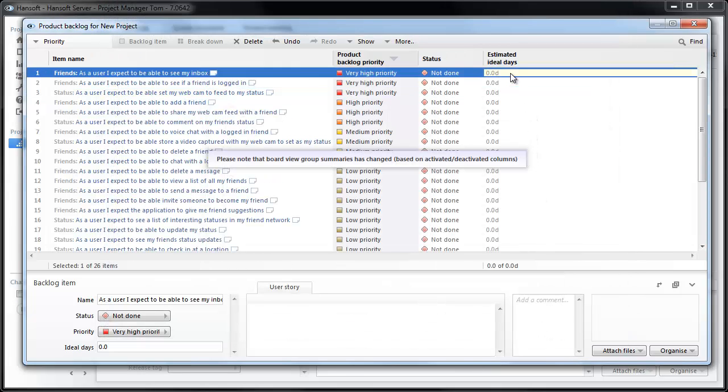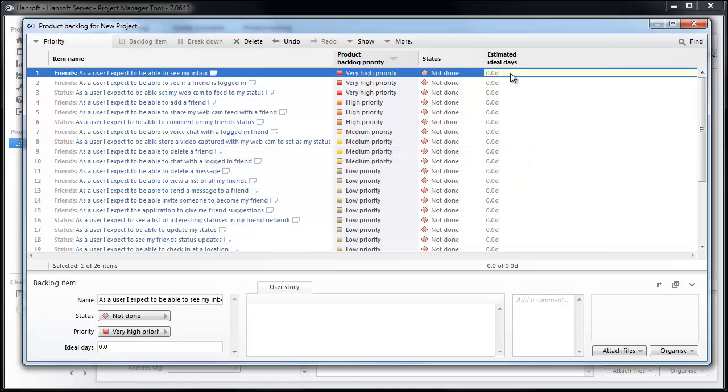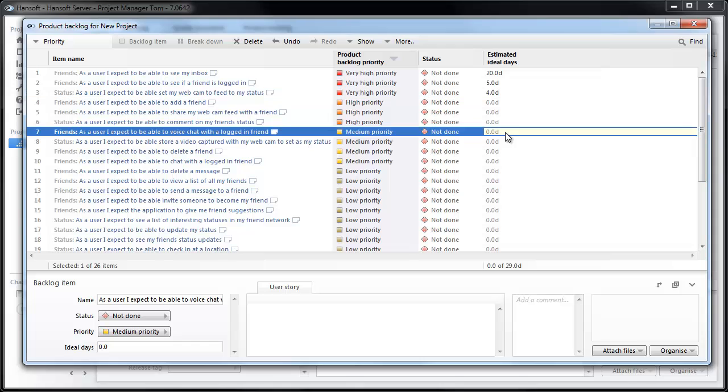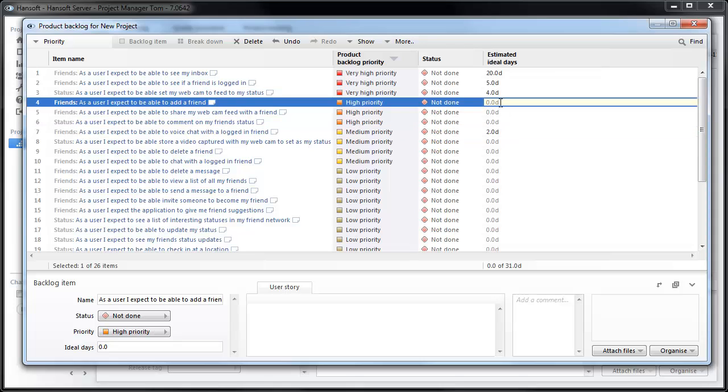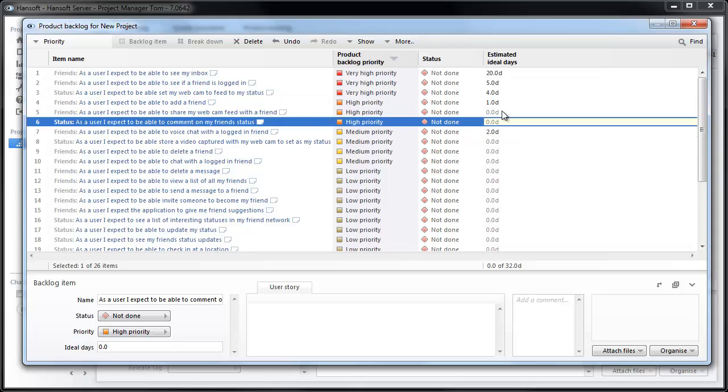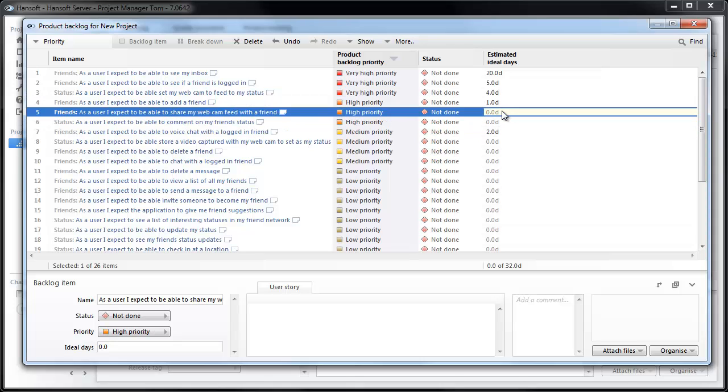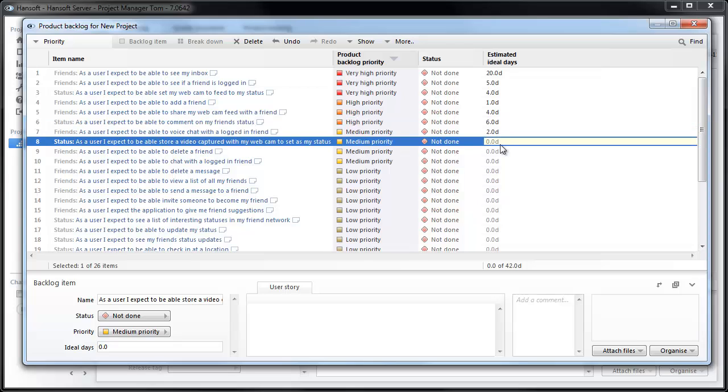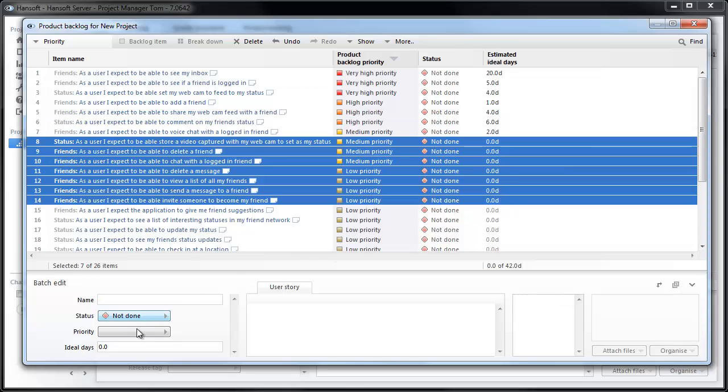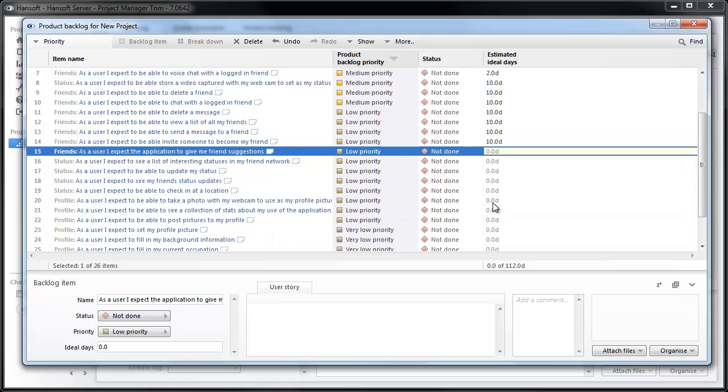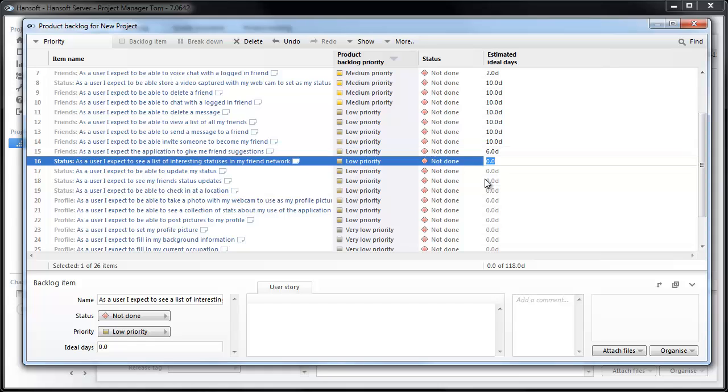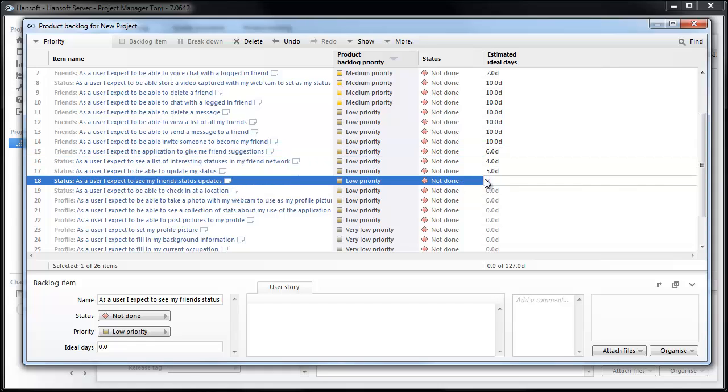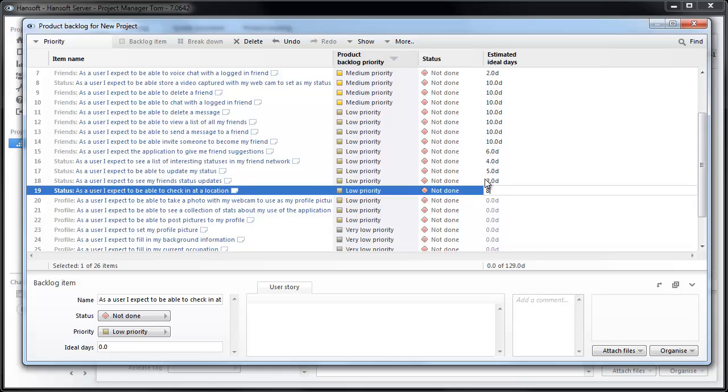So I'm going to add estimated ideal days to this project. Now we can start adding a guess on how big these items are. Let's say that we believe that this is about 20 days, this is five days, four, two. I'm just going to go through these and set out a few numbers. You can select several and put the same number to all of them. We can just use the keyboard and enter to go through these.